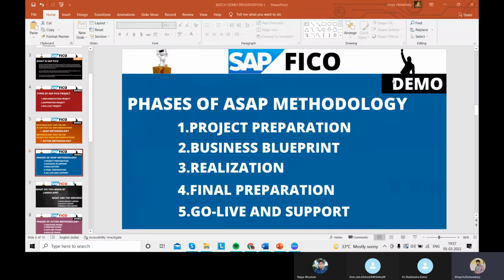From that date we migrate the data, and once the go live is done, they will use SAP to post invoices and everything. We call this the cutover period. Generally, we take 2 days to upload the data from legacy to SAP. It's a normal time. After the cutover period, we go to the next phase.